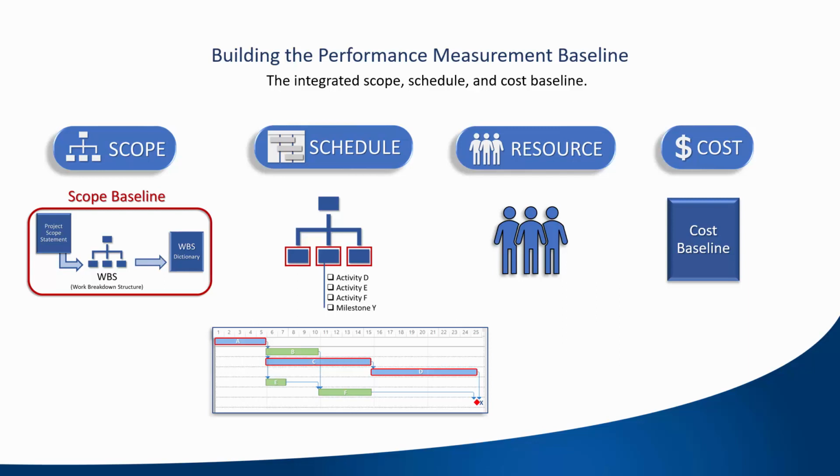The schedule also influences costs as it lays out the expected rate of performance and dictates the time of year that activities will be performed, which might influence their cost.